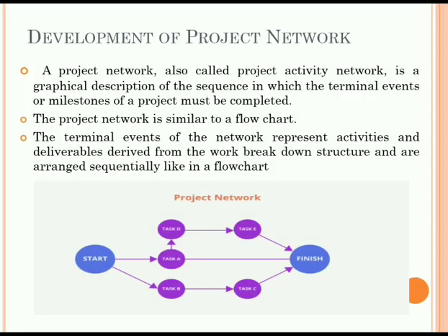There are some ways of developing the diagram and connecting the tasks based on the precedences. First is finish to start: an activity has to be completed before starting the next activity. Start to start: both activities can start together. Finish to finish: both tasks need to finish together. Start to finish: this is a rare dependency and requires one activity to start before the other can be finished.